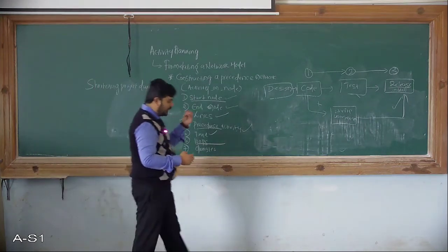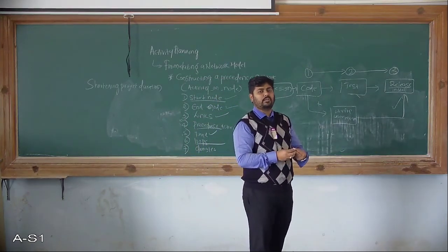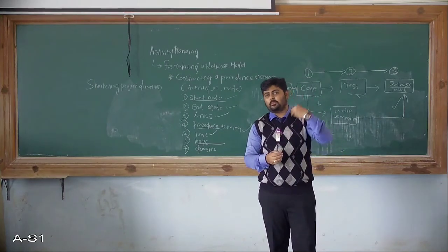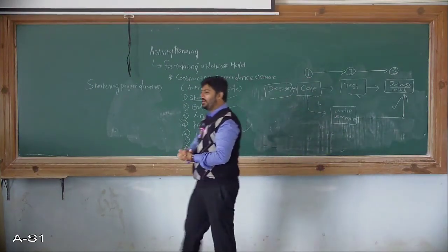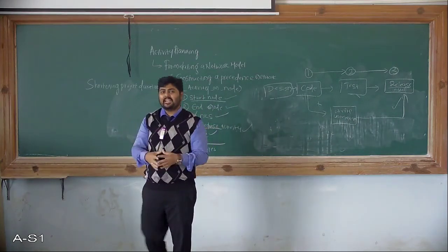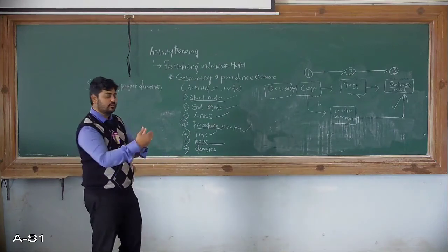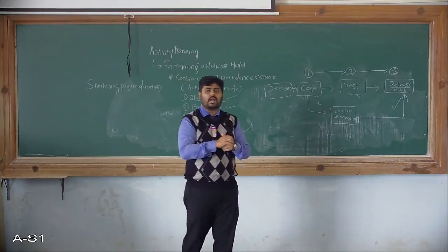So the resources from the nodes involved in the non-critical path can be shared with the activities on the critical path, so that there is no delay in the execution of the project. Whenever it is required, because we do have a time span to start with that particular project.